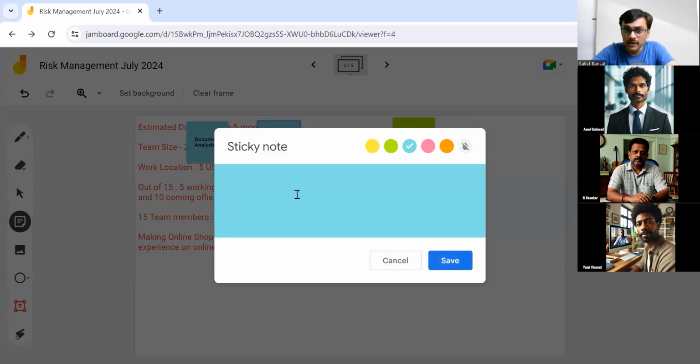I can also see my organization's history: in the last project, what all we faced. For example, Ramki's point, we can say we have 30% of people leaving the team. So we can have 30% attrition, a lot of turnover happening. So that could be a risk.